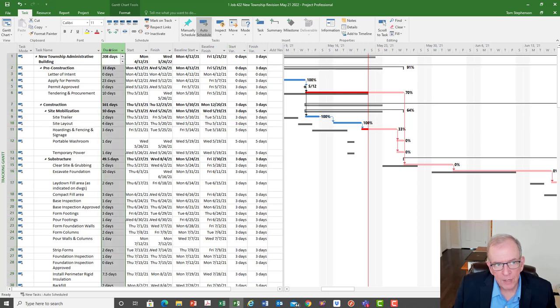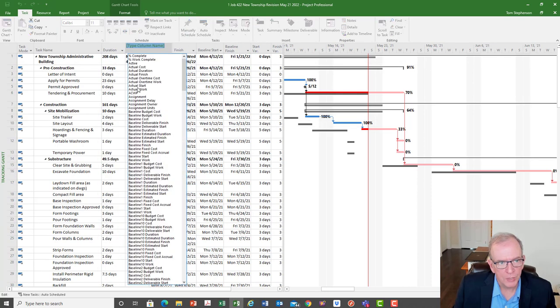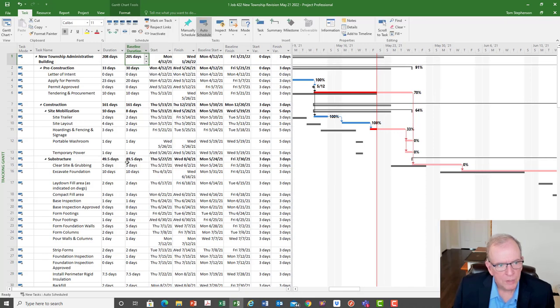There is even another column. It is referred to as the baseline duration. So I can insert that column. All I did was right click, pick insert, and I can type, as long as I know the first letter of it, I just have to type that, baseline. And there should be one baseline duration. So you see here, like I said, the baseline duration, the original plan was 2 days.